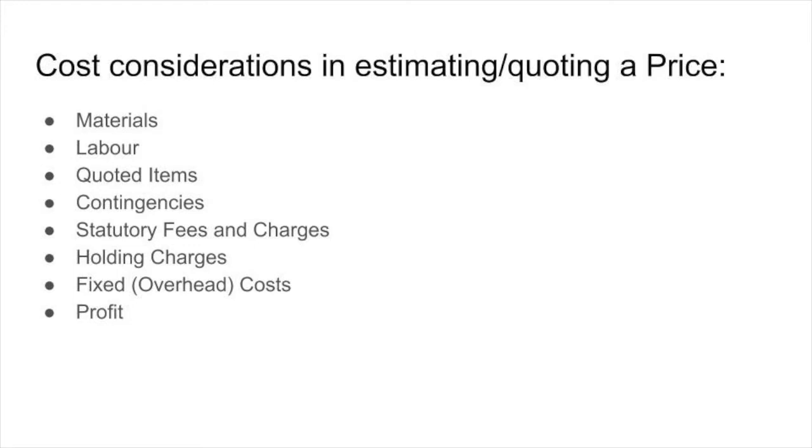Labor is another important process within a project. You have to consider how long it's going to take you to do the job. And you want to be recouped on, let's say, a per hour basis. So if you estimate that it's going to take you 10 hours to do something, whatever your rate per hour is, say $30 an hour for 10 hours, well, you're going to have to charge $300 for labor. The longer it takes, the more labor is going to be required. The longer it takes, the more materials are going to be required. Again, these are all variable.